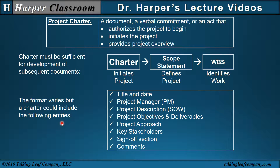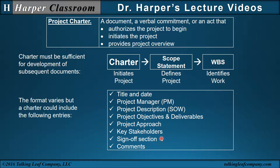The format varies, but a Charter could include: title and date (start and finish dates), project manager (PM), project description or Statement of Work (SOW), project objectives and deliverables, project approach (which could be a process or identifying departmental authority), key stakeholders, and a sign-off section authorizing initiation or formally recognizing and finalizing the Charter, and comments.